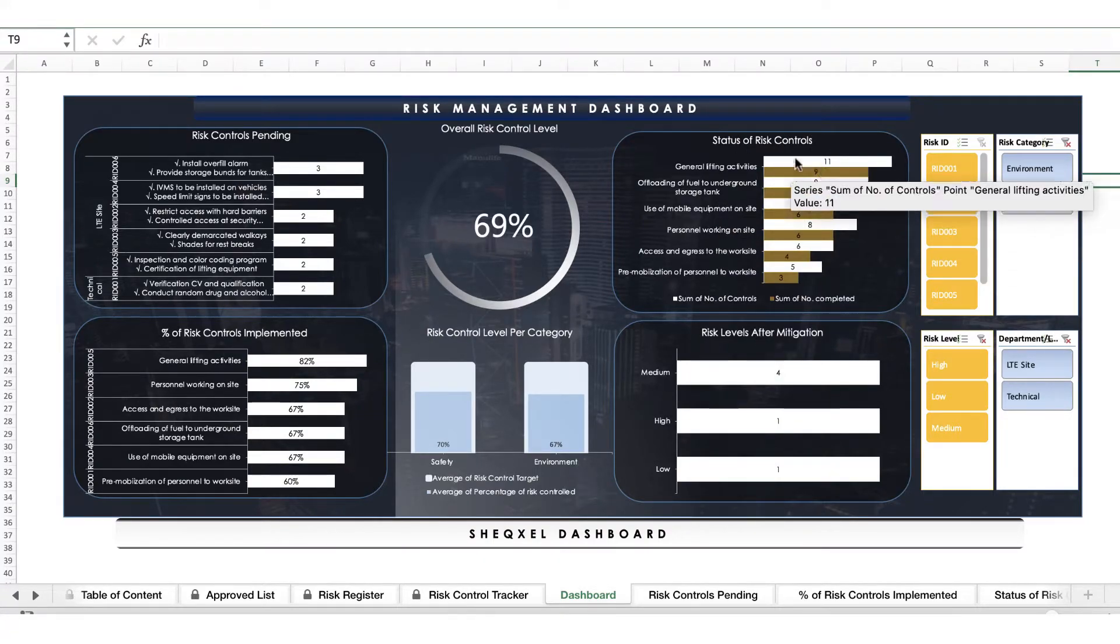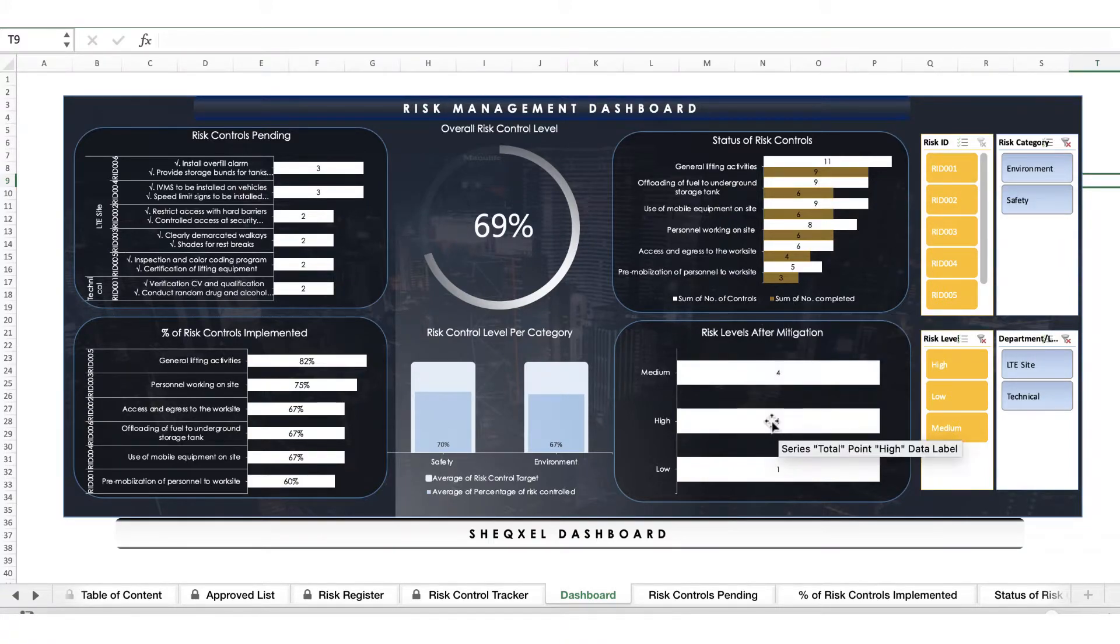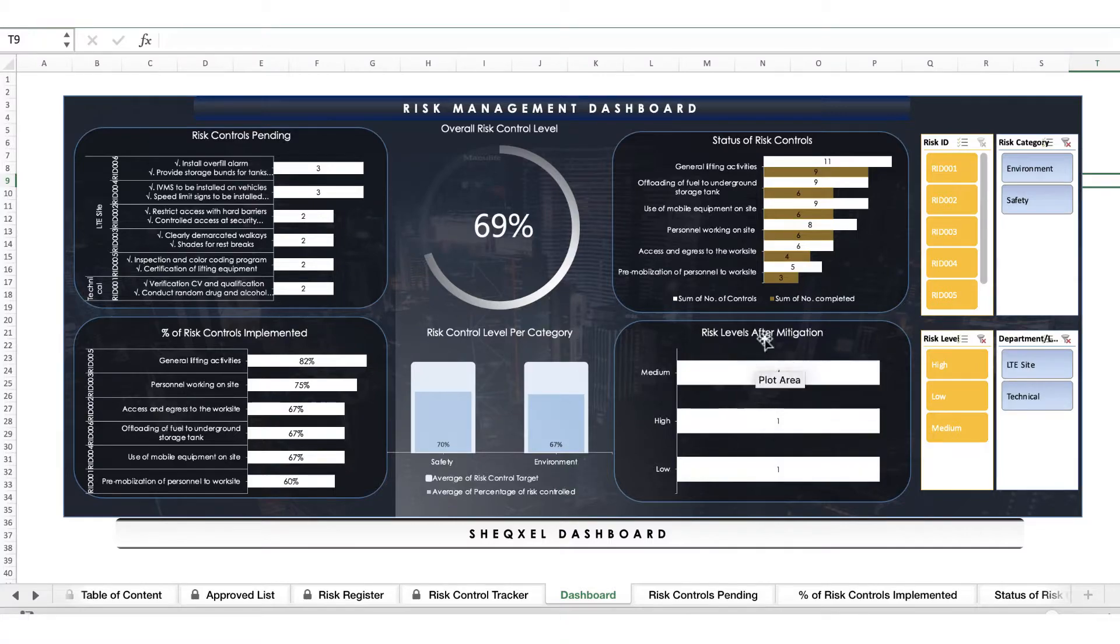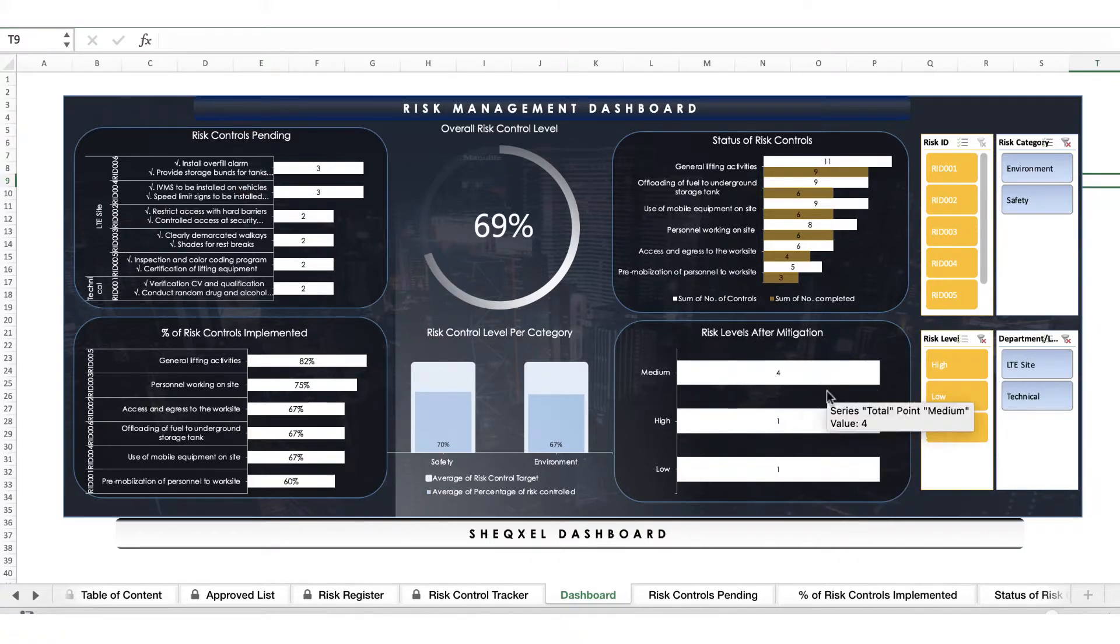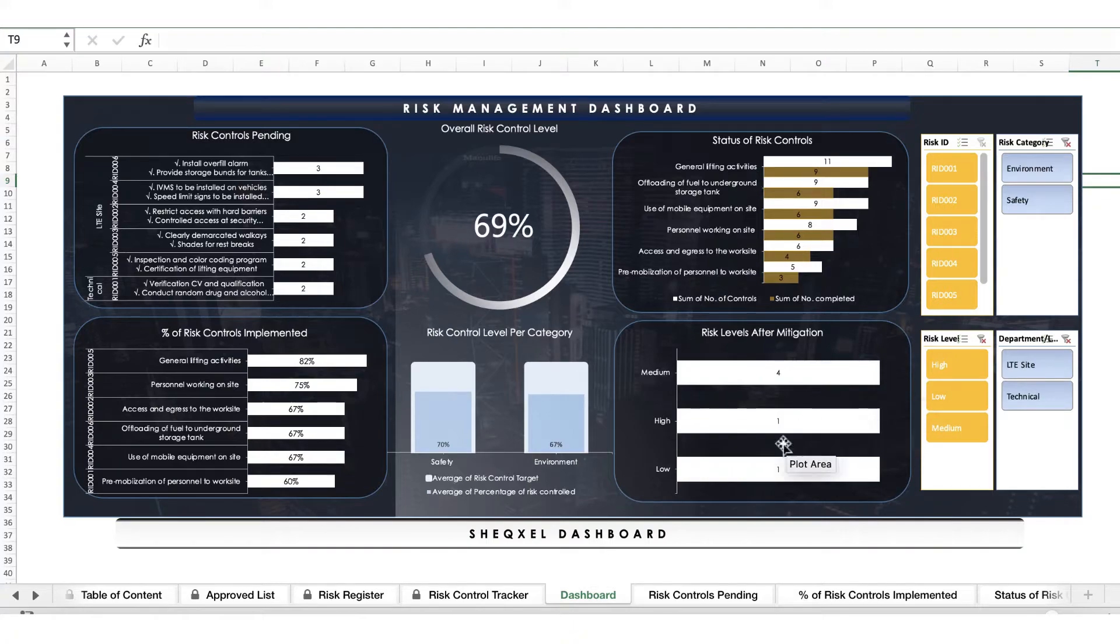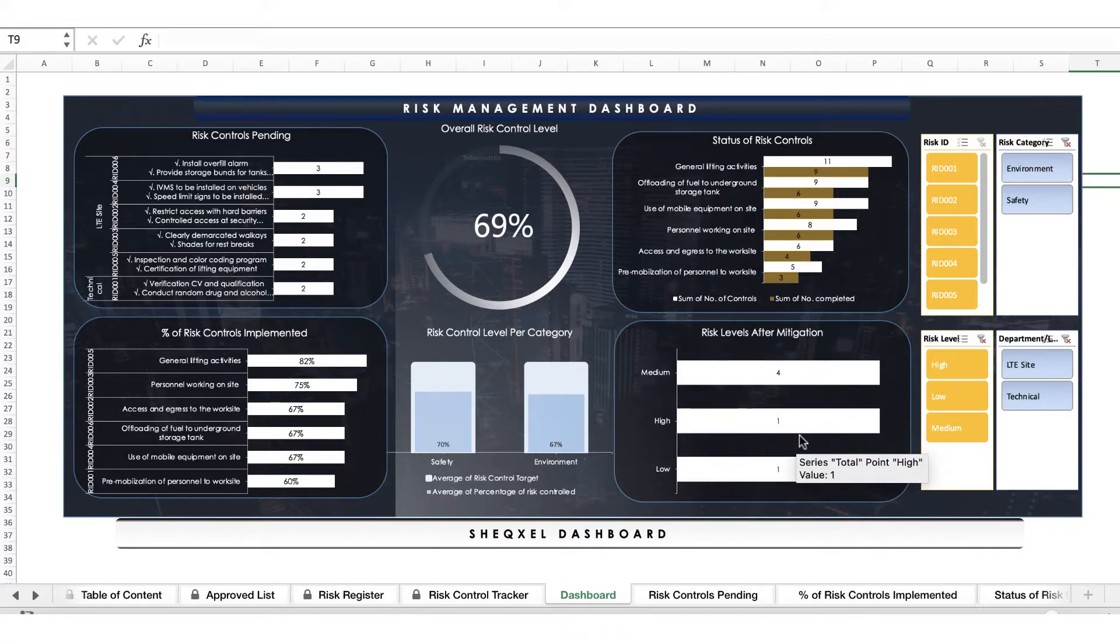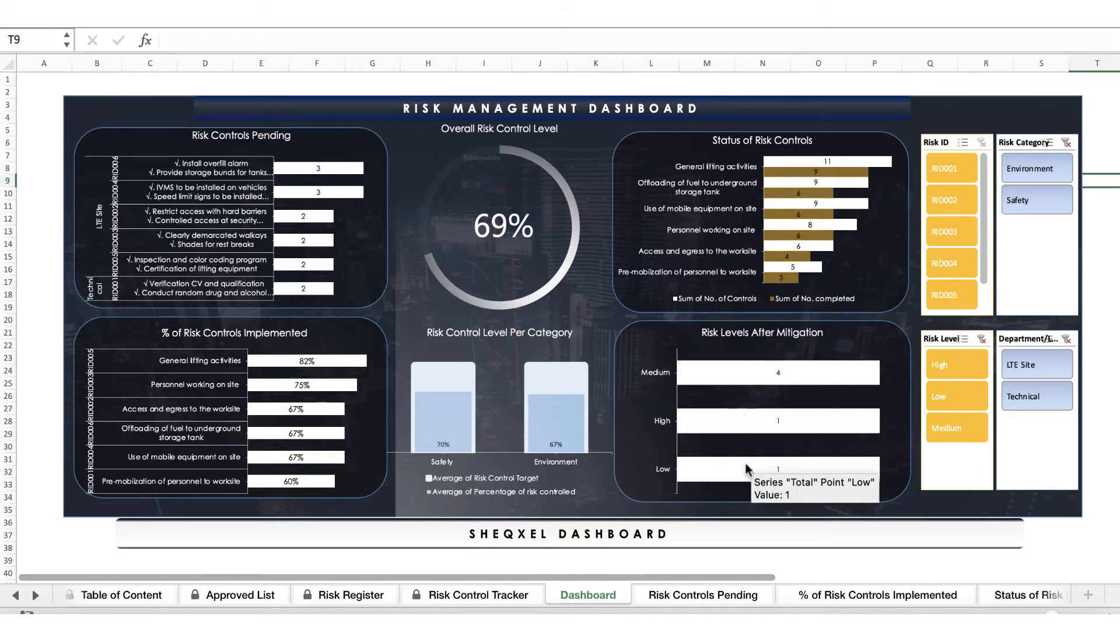Based on the numbers that were identified and what have been implemented we have the risk level after mitigation. Having implemented all the controls you would be able to now tell which of the levels of risk are within medium and high or low, and the highest number will tell you that overall you have majority of your risk within the medium risk category. You can actually go beyond that to make sure that all your risk within your organization are actually within the low risk category having implemented effective risk control strategy.